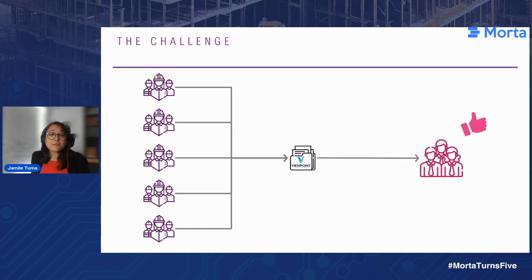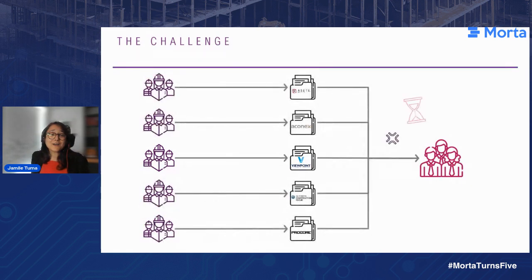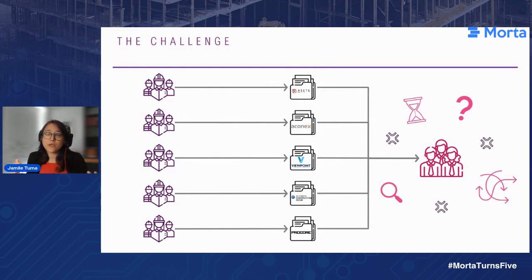Now, we have a different scenario in other frameworks where, for a number of very understandable reasons, there is no commitment to one platform. So the main contractor's CDE solution is what gets adopted as the project's CDE solution. And this creates a challenge for the client team, given that now they will have to familiarize themselves with different systems. But not only that, the various delivery teams will have different ways of managing the same system, right? So different systems and different setups.